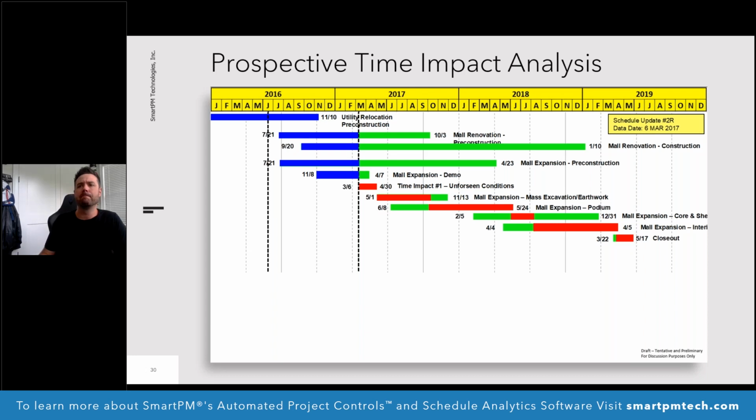One other point here is this is a summary schedule. First of all, when you're producing something to show to somebody, it's always good to summarize the schedule to what you'd call level 1, sometimes maybe a level 2 or level 3, where you're looking at trade and area. This is a level 1, and in the actual schedule file itself, this may be 10 activities that are logically tied. You want to show that fragment, but then you also want to give that summary version and make it as consistent as it was at that summary level, so that the person you're explaining it to can digest it in their head, and then all these dates line up.